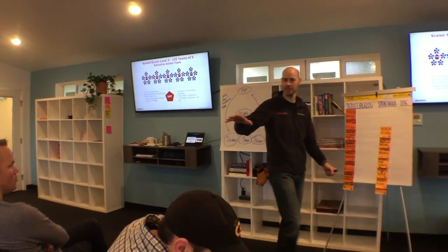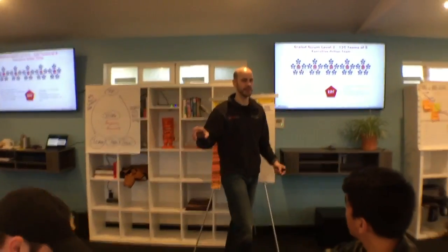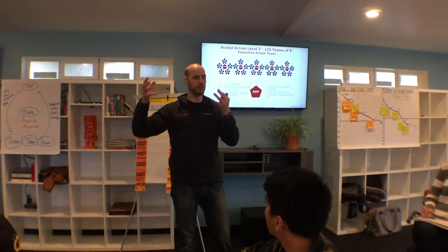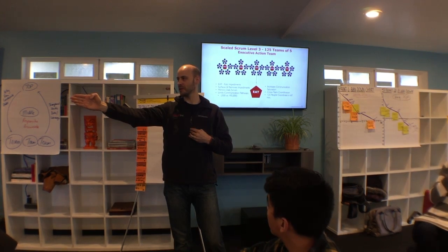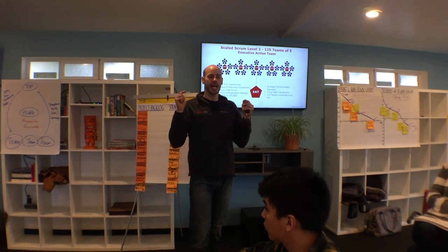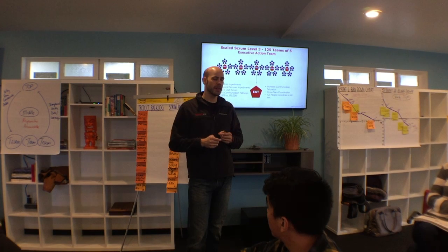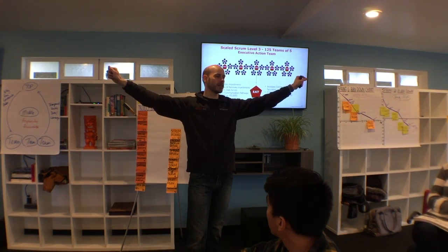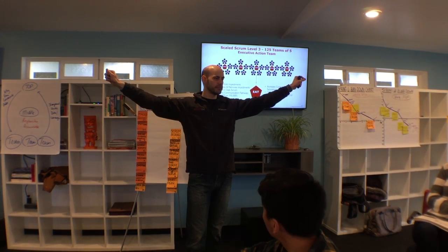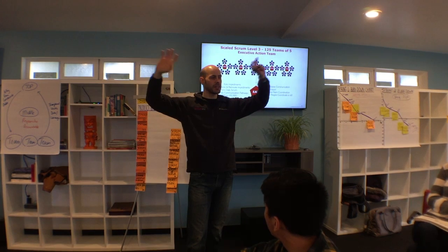So we have 6 teams here. Teams brought up impediments and accelerants, which we have logged, or a version of logging. We have some notes. Right after daily stand-up, the Scrum Masters typically swarm to say which of these impediments can we pull to one of our backlogs to get it done. That's the job. So impediments become cards that go into backlogs.